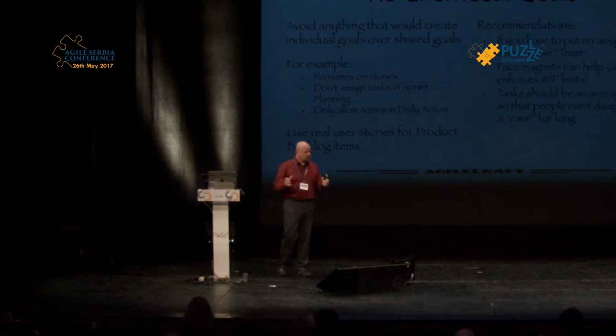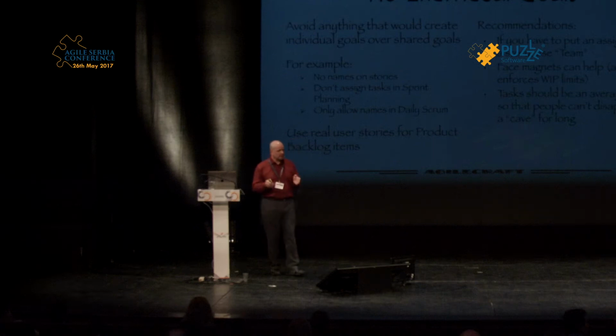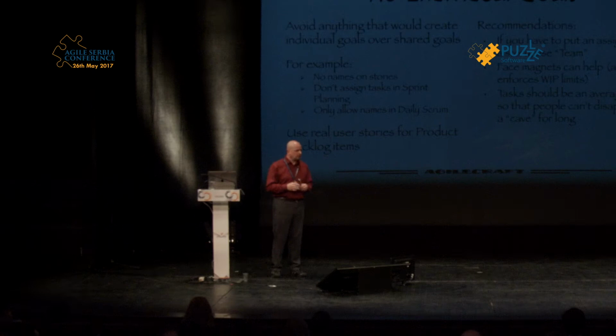If your tasks are small enough, like half a day on average, which of course you will much more easily get if you use the story level design, people can't go into a cave for very long. As an average of half a day, they have to come out of the cave during the day, pick up another task, and go forward. You will know immediately, at the next daily Scrum, if the person is still in the cave. And that usually indicates that they have some kind of trouble with the thing, and you can go and help them. Now, that's assuming that you do tasks individually. Now, if we go deeper into that,